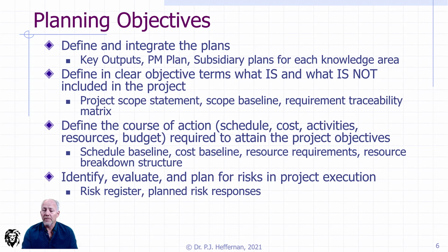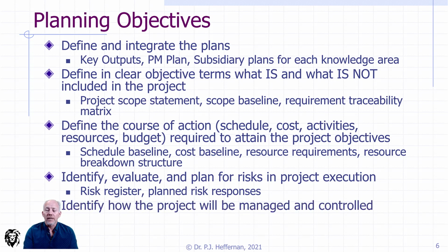We didn't talk a lot about it because it's not often referred to in that context, but certainly the risk management process happens during the planning cycle and needs to be integrated into those baselines. You don't want to lose that. It is as important as all of them. The other thing to consider is that you need to identify how the project is going to be managed and controlled. As we will discuss when we get to the work breakdown structure, you have to account for the tasks of managing and controlling the project and make sure those are scheduled in and around the tasks that are delivering on the project itself.